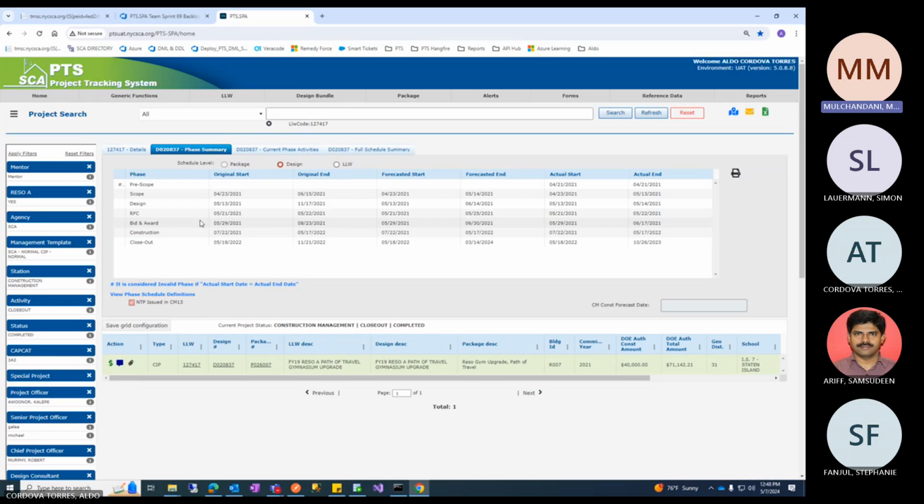ANE works differently. It clubs a bunch of LLWs together and does the work together. So first thing they do is when they get it: now the status, when we did the forwarding, the status changed. So it went to AE. It was showing whatever the status was, AEPS, I think AC or something. So there's a change of status when routing is done. That's another area where there's change of status via PTS. So there is no date as such updated, but there is change of status.